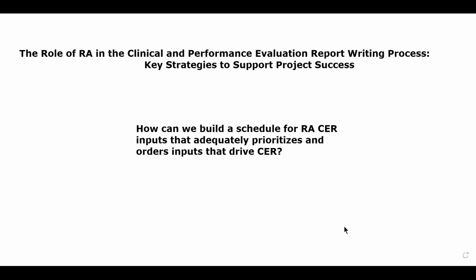How can you build a schedule? I would say, look at this webinar. Start with the pre-planning. Go through the steps and perhaps make a list or a spreadsheet of the key inputs that we've talked about and the key decisions. Inputs are one thing. Those are documents. Sometimes inputs can't be finalized until decisions are made before that, such as the IFU, or a potential design change or change in intended use. Clearly, those decisions precede the change to the IFU and other documents. Design changes are a big trap sometimes, because maybe clinical and regulatory affairs isn't fully clued into whether a design change is coming or when it can come.